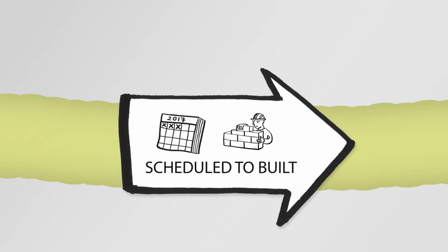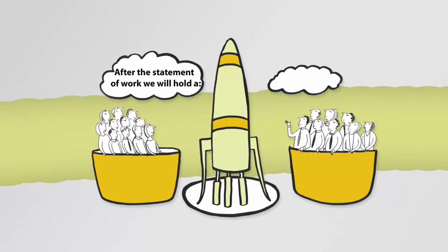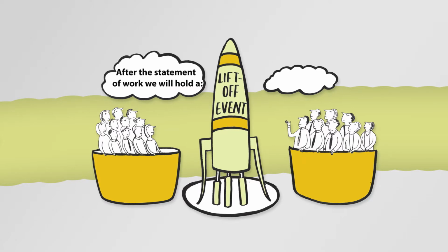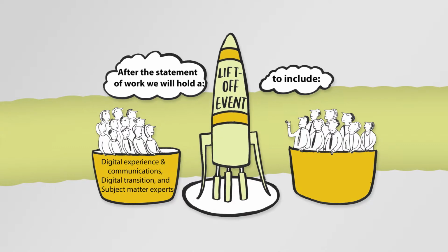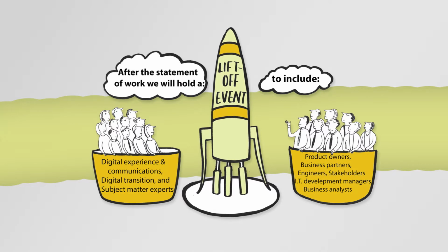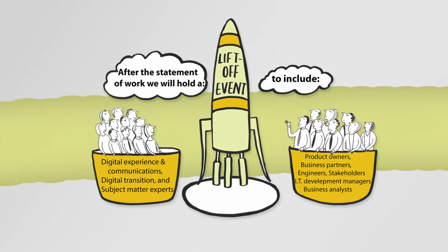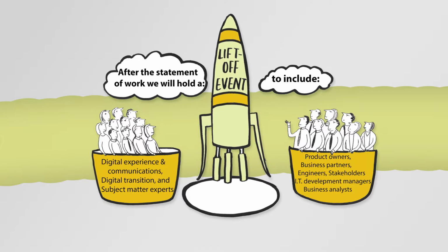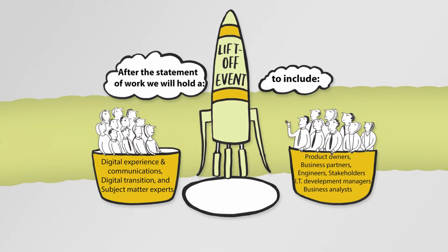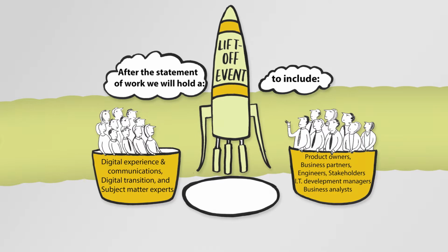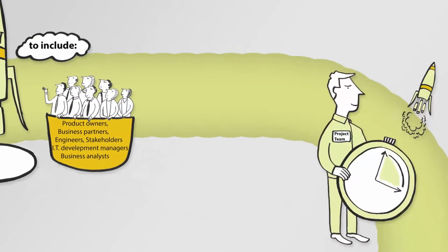Schedule to build. After the statement of work is created, we will hold a lift-off event with the project development team. This will include the product owners and business partners, the engineers, the IT development manager, business analysts, and any other stakeholders with interest in the project delivery. For solutions that involve a buy solution, the vendor is heavily involved at this stage.